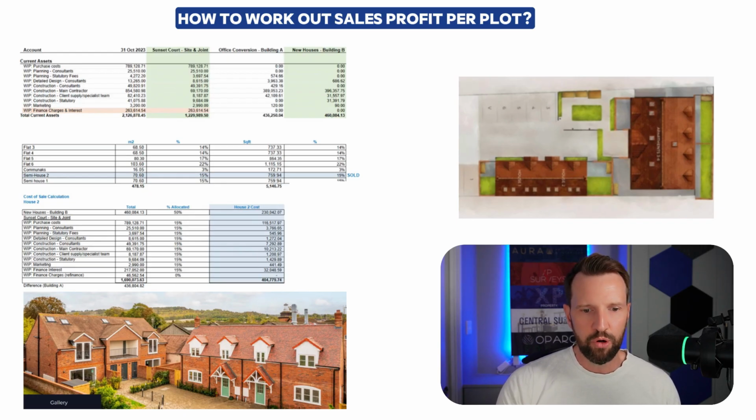We've broken that down, with 15% of that floor area compared against the total taken from that site joint cost. So 50% of the individual JCT contract goes towards the actual build costs. And then there is the best part of £170,000 that we can apportion from the site-wide costs to that individual plot, taking our total cost for that plot up to £405,000. So that's how we work it out.